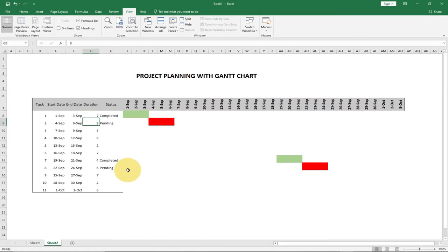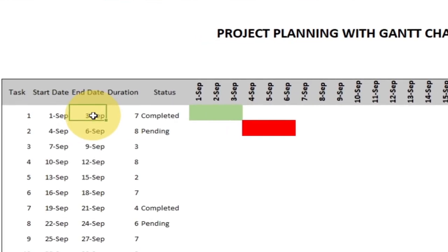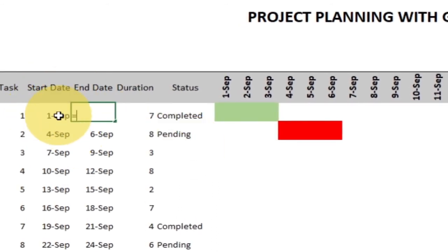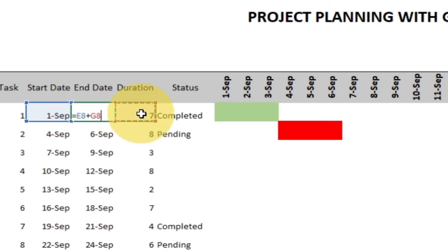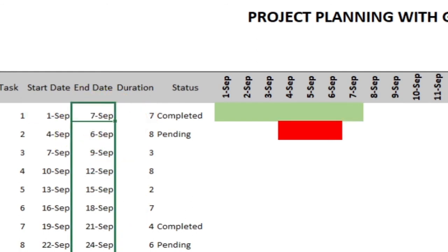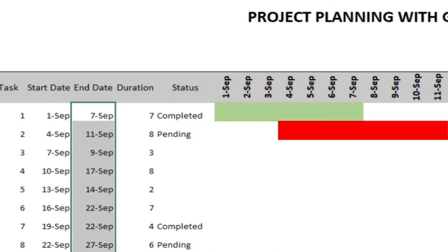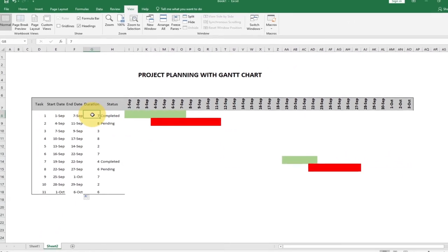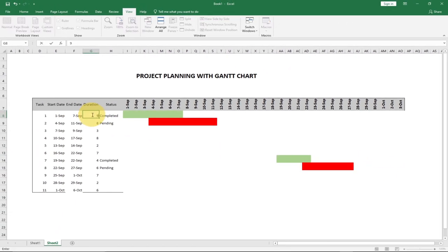To make the end date dynamic, I'll click on the end date cell and type a formula: equals start date plus duration minus 1. Then I'll drag this formula down to apply it to all the rest of the rows. You can see it's already updating the chart. If I change the duration to 9, the bar updates to span 9 days. This makes the chart very interactive.